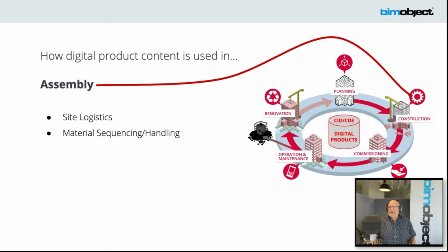They're actually planning down, in some cases, to the 15-minute increment when another truckload of material is going to arrive, and the crane's scheduled out to move that in the most expeditious manner. So we're not tripping over material that's not going to be needed for a few hours even, much less a few days or weeks, which has been the past.